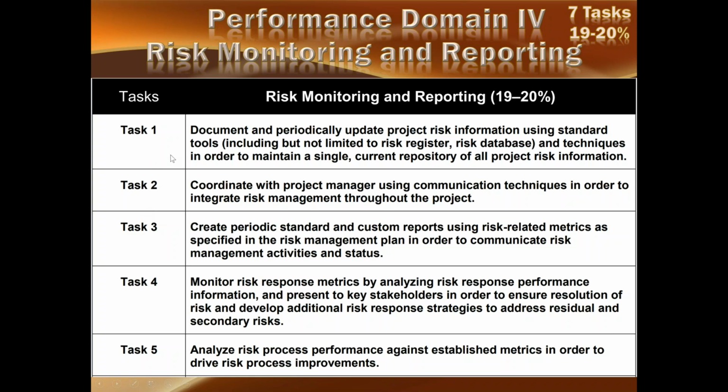Task number 1, document and periodically update project risk information using standard tools. First of all, we need to document and periodically update project risk information, using standard tools like risk register, risk databases, and techniques like maintain a single current repository of all project risk information. That is called a risk register. Coordinate with project manager. That is the second task. Coordinate with the project manager using communication techniques. Coordination, communication techniques, and why? To integrate risk management throughout the project.